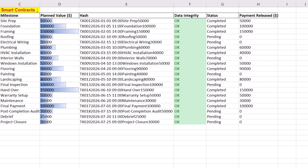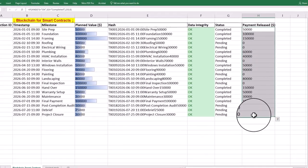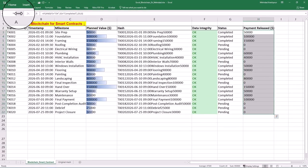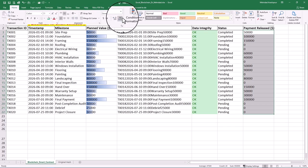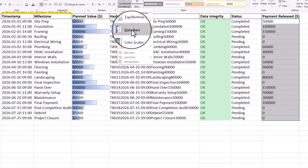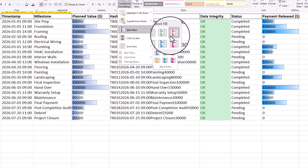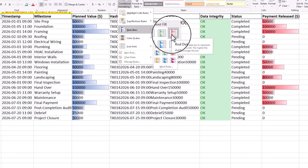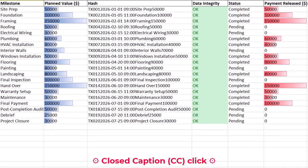You may use conditional formatting to visualize payment releases and for project progress tracking. For this, select all payment values, go to the Home tab, choose conditional formatting, and select data bars. A suitable color and style should be selected to suit your project contract management reports. Data bars provide neat visualization of payments and progress of project activities in our smart contract.